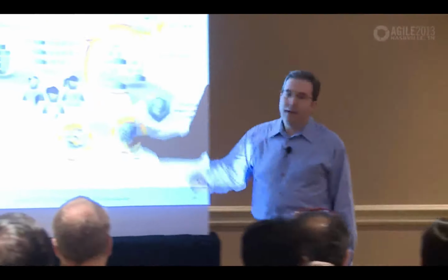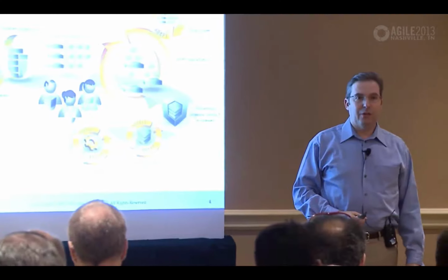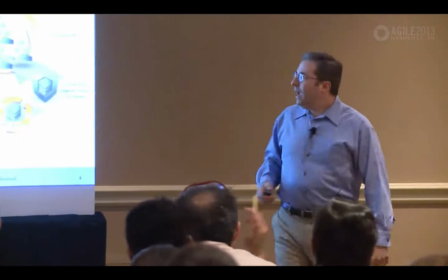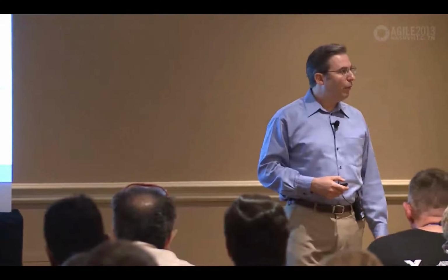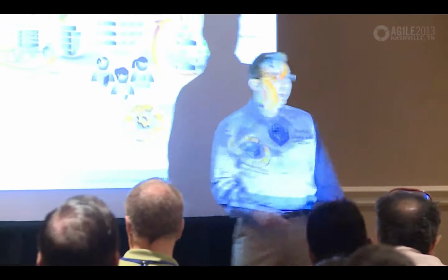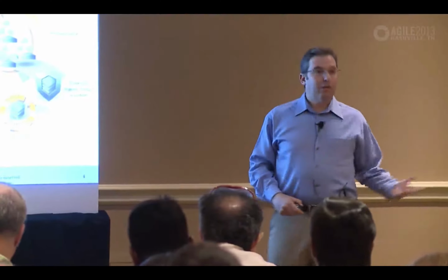We break down that vision into a set of features. Think of this as the blue bricks. The blue cube becomes the blue bricks. And we put them into a prioritized list. We'll call that the product backlog. The process by which that takes place, we might refer to as product backlog grooming: things like writing and refining, estimating, sizing, sorting them, prioritizing them. And then we start sprinting.